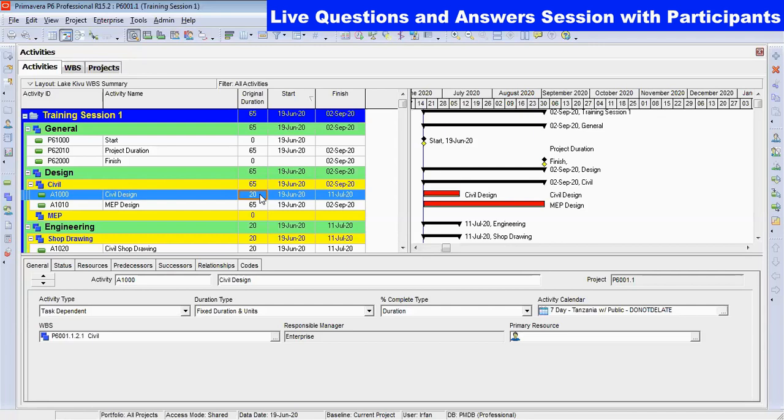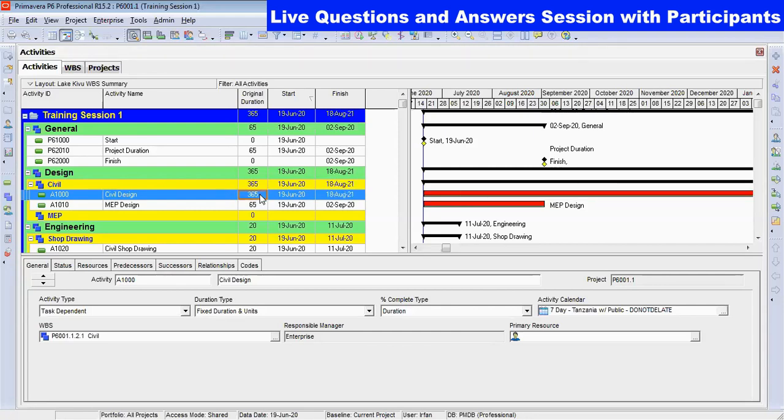And Arslan, answer to your question again, can we change it to years? Yes, you can change it to year. You can put here 365 days or whatever the working days according to your calendar. But technically, if you are preparing a program and you are putting an activity having more than 50 or 60 days duration, I believe no one will accept, because when you have a program, this program is to track and monitor for each activity how you are going to finish your project. But if you have an activity for a whole year, then it is useless.